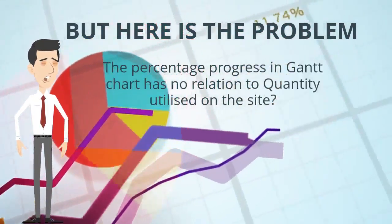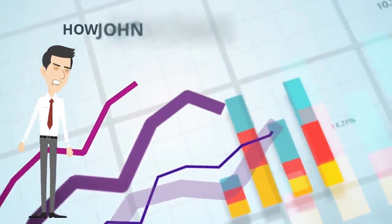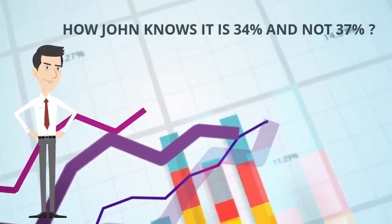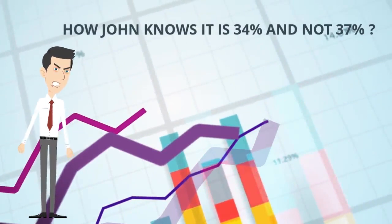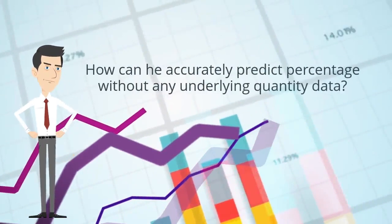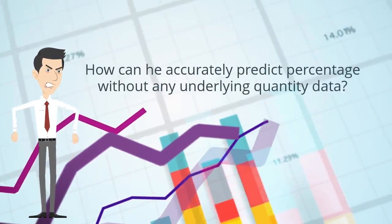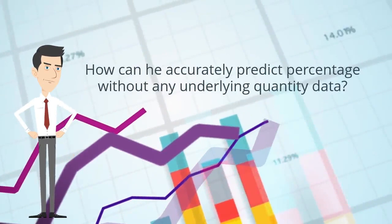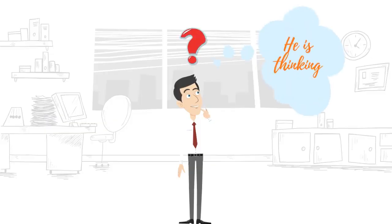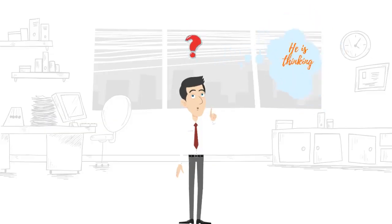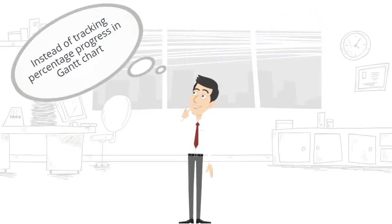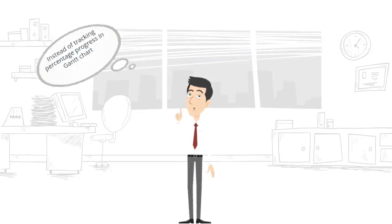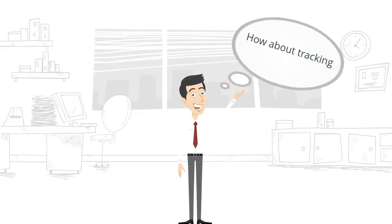Utilized on the site, John knows it is 34% and not 37%. How can he accurately predict percentage without any underlying quantity data? He is thinking: instead of tracking percentage progress in Gantt chart, how about tracking material utilization?